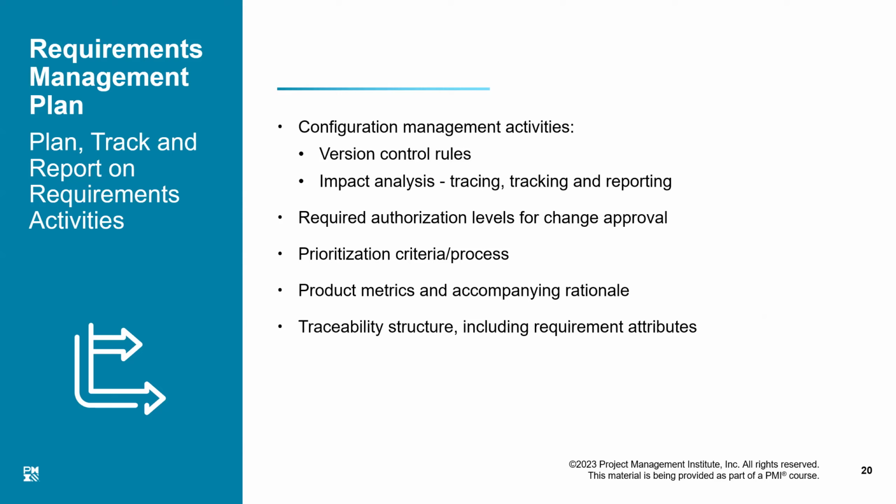Once the scope of the product has been explicitly defined based on the requirements traceability matrix, the scope of the product is what exactly is to be produced, and the scope of the project is how it is to be produced. Got it?